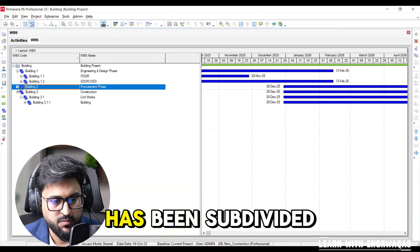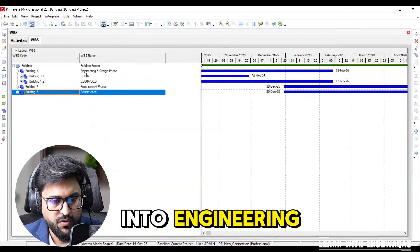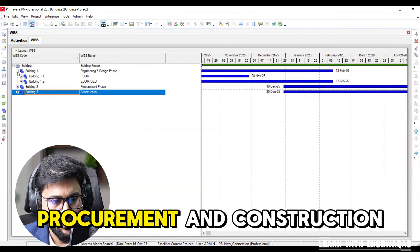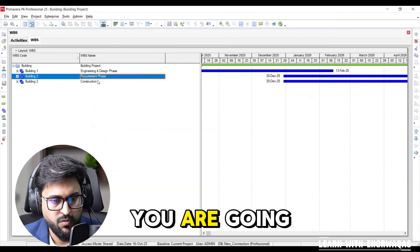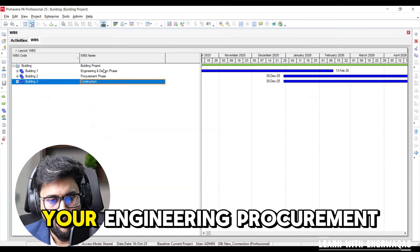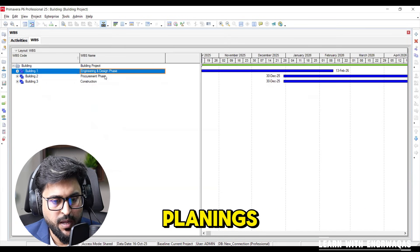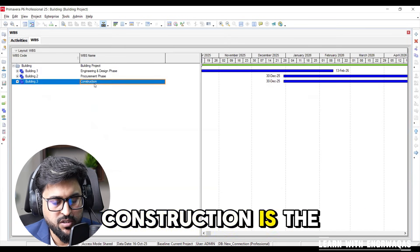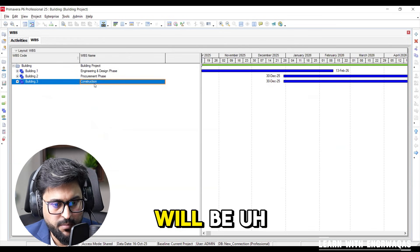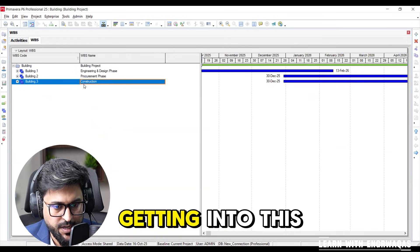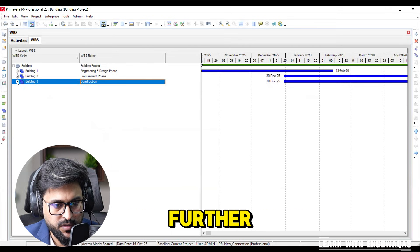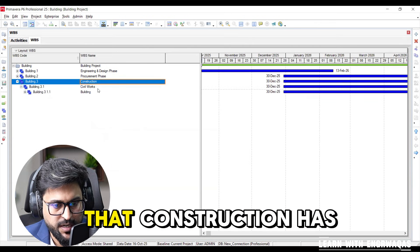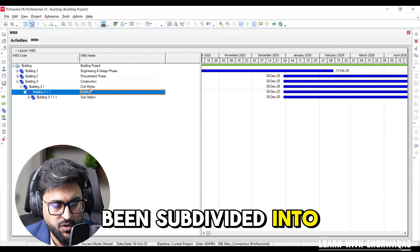Into engineering, procurement and construction. First you are going to make these deliverables: your engineering, procurement or head office planning, construction. The BOQ will be getting into this one construction.